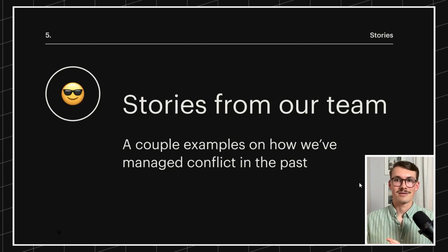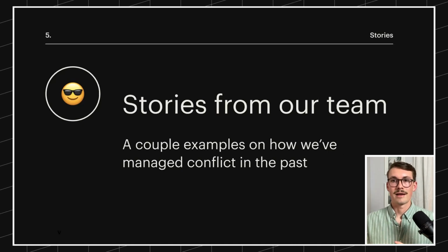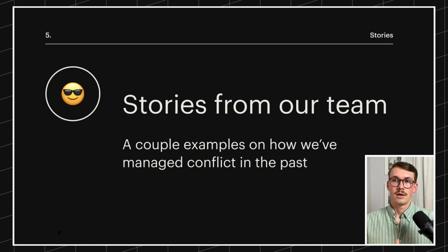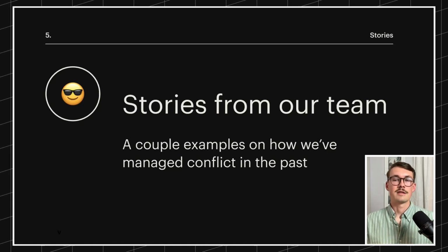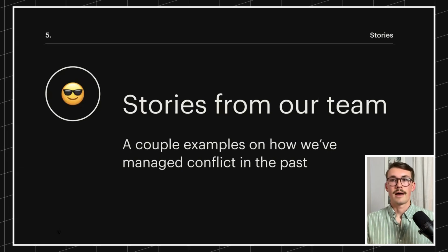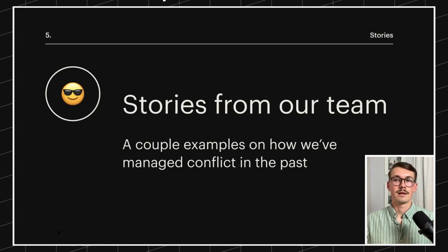So here's how Maggie solved the problem. We spoke with the developer and confirmed that it was possible to build those pages out before the website went live. So we provided a solution. And then we told the client that these pages were not included previously in the scope, which was due to miscommunication on both teams, and that we'd be happy to develop them before the deadline. So we admitted some fault.